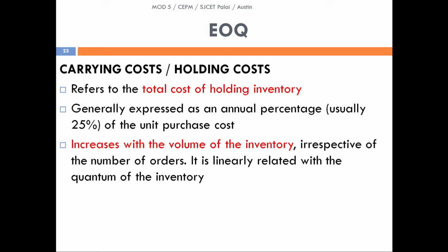Carrying cost is nothing but the cost incurred by the company for holding the inventory, or the investment done by the company for keeping the stock for a long period of time. So this also tells us about how much we should buy. When we are buying, we should be able to understand how much it costs. If we are going to buy a large amount of material and stock it for a long period of time, then the company must understand the amount that is to be raised for proper storage of these materials. So it is expressed as a percentage, about 25% of the unit purchase cost.